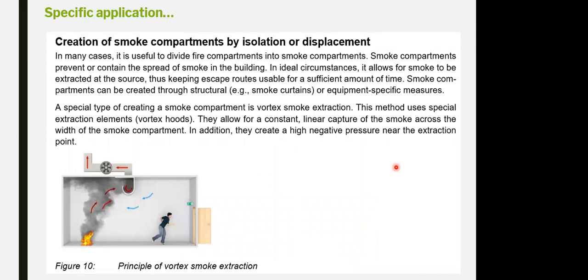In some cases, if you have multiple levels of basement, they call for the worst case scenario, which is the lowest level of the basement. And some of the reviewers ask for a full simulation of the 3 levels. Some cases they request only the worst case. Some cases they request all 3 levels. I have had both cases when applying.